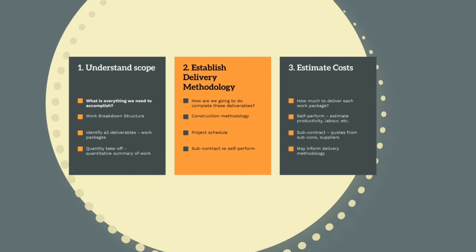And finally, in step three, now we know what has to be done and how we are planning on doing it, we can estimate costs. How much money do we need to complete each work package? For our self-performed costs, this will require us to estimate our productivities, our labour, plant and materials. When using subcontractors to complete the works, we'll need to get quotes from subcontractors and suppliers. It's worth noting that all these steps are iterative, meaning they won't exactly occur in that order and the results we get from each stage will impact the previous step.